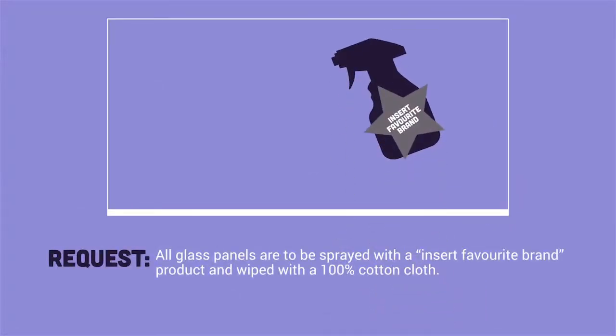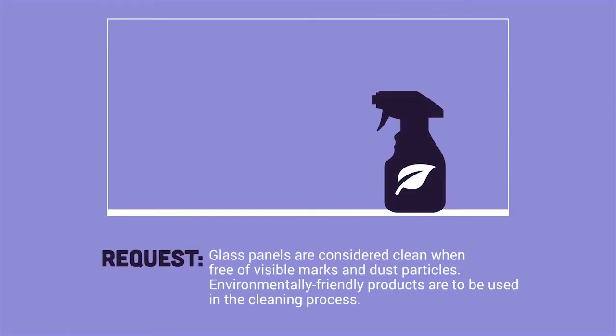At the other end of the scale, say you're requesting cleaning services. The level of detail in this first description is too prescriptive. A better example would be this. Here you also need to include a definition of what is considered clean. Services can be very subjective, but still need to be agreed and clear to avoid ambiguity and misaligned expectations.